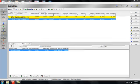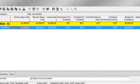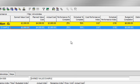In previous lessons, we calculated earned value and planned value, so let's just do a quick review of some terms. Schedule percent complete reflects how much of our schedule has been consumed as of the day-to-date. It is used in the calculation of planned value.